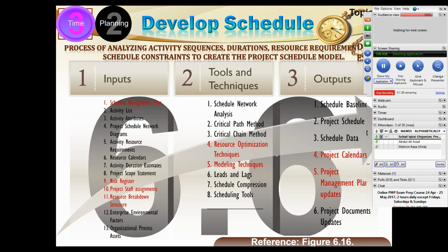Therefore, for all practical purposes, 10 days if assigned to a job will be the minimum 10 days this task will be done, because nobody is going to give any time out of those 10 days back to the project manager, and therefore that will never ever be used for the benefit of the project. But if at all you get delayed, always the project manager will be asked and the project will be impacted negatively. Are you with me? Yes, sir. Okay. Now I am coming to the solution.